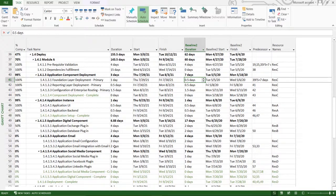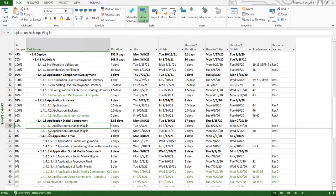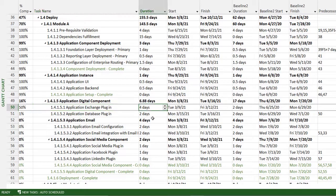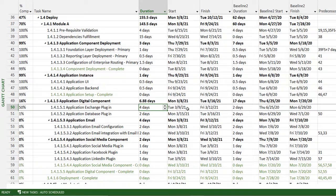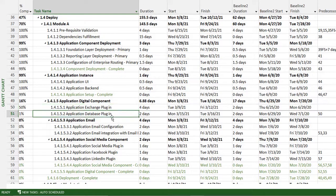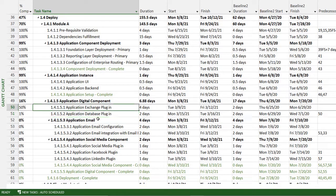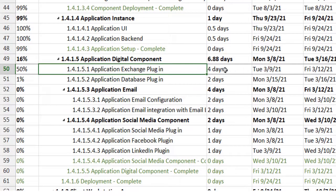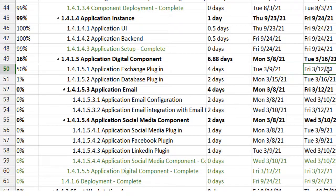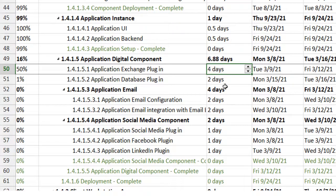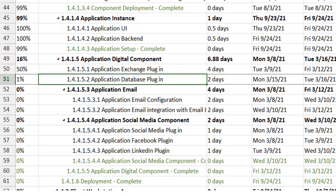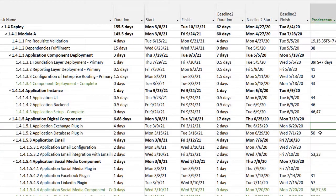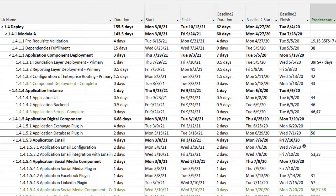At times we face situations where we have some tasks dependent on one another, and due to changes in the task, the parent task duration or the dates do not reflect the changes on the subsequent task. To give you an example, let's say I have task number 50 which is starting on 9th of March ending on 12th of March. It has four days of duration and task number 51 is directly dependent on task 50 from finish to start perspective.